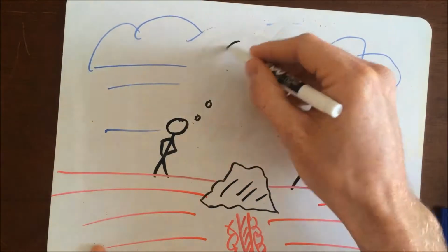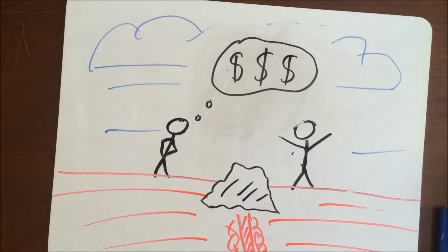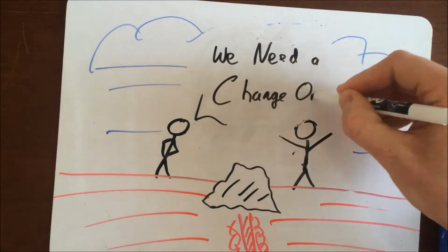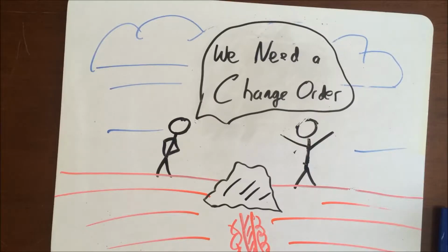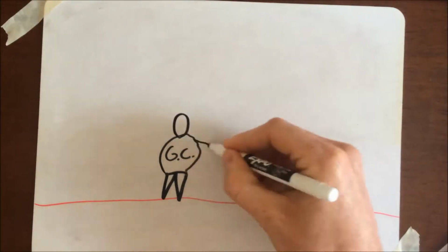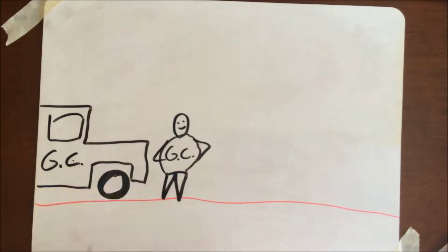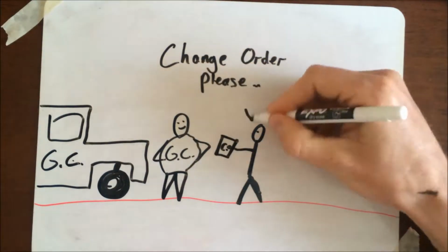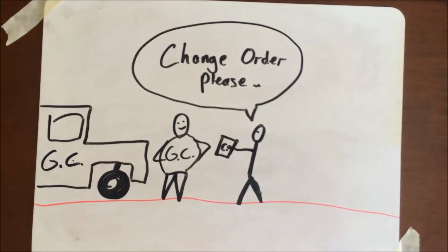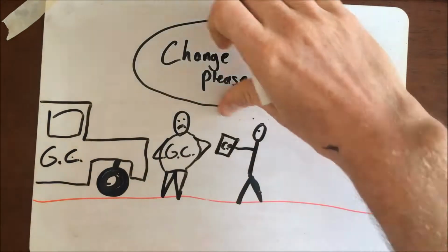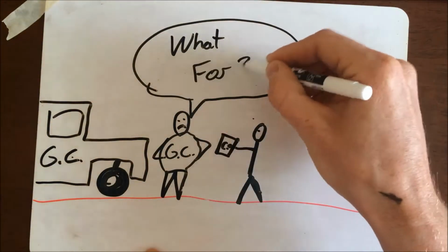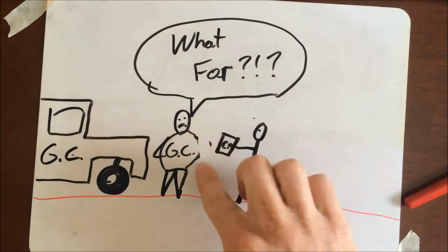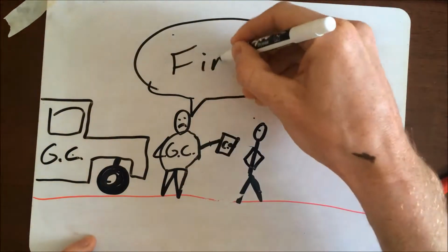But that is going to cost the subcontractor a lot more money, and not wanting to accept a loss, he is going to want a change order. Since the subcontractor is only contracted with the general contractor, he first has to find the GC and ask him for a change order, which might result in a conflict right there if the GC doesn't think it counts as a differing site condition. But eventually he probably will accept the change order and pass it on to the architect and engineer.